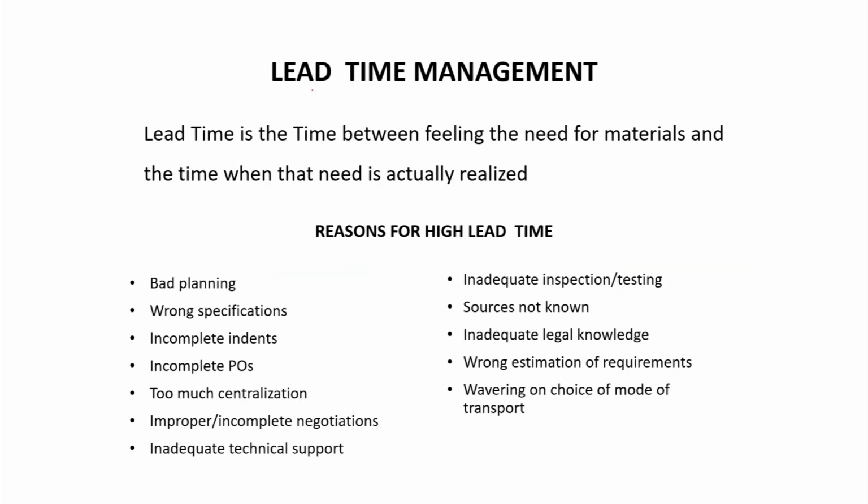Now, let us see lead time management. Lead time is one of the important factors. We have seen safety stock, and there are two aspects of lead time. One is that because of the lead time, the uncertainty increases. The more the lead time, the more the uncertainty. Second, because of the lead time, you have to keep high inventories, the reorder point also, so based on that you will have to keep more inventory.